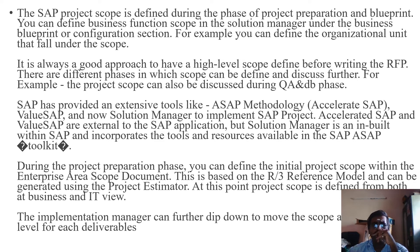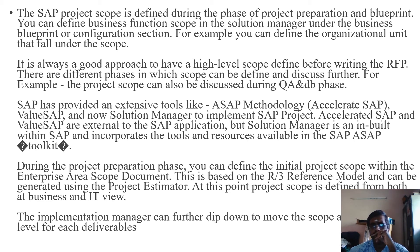For SAP projects, the scope is defined during the project preparation and blueprint phases. You can define the business function scope in Solution Manager under the business blueprint or configuration section. It is always a good approach for any SAP project to have a high-level scope defined before writing the RFP. The scope can also be discussed during question-and-answer and development phases. SAP has provided extensive tools like ASAP methodology — Accelerated SAP — Value SAP, and Solution Manager to implement SAP projects.